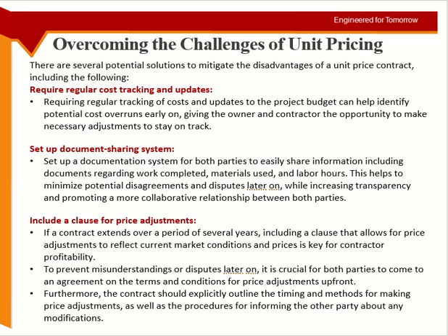So the point was regular cost tracking. Don't wait till the end to find out, oh, I spent so much on it. Do it during the work so you can control it. After you did the first day of excavation, now you know that it is supposed to cost this much, but it has actually cost this much. So you are prepared for the next day now. Get my point? So this is what we mean by cost tracking.